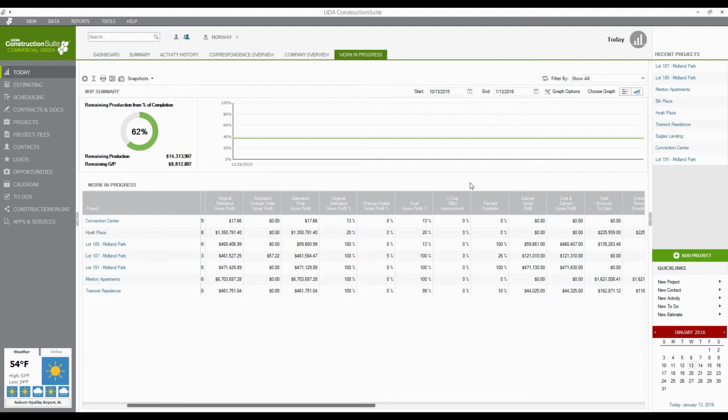Money on the table, though, in terms of jobs. Yeah, absolutely. And you could also lose jobs because you're too high. You could not be the lowest bidder or be out of the price range because you're overestimating. And for the jobs you win, it's great. You can get a little bit higher profit margin on those, but you're probably losing more money by leaving jobs on the table, as Rachel said, than you are from estimating a little higher. So you can see that.